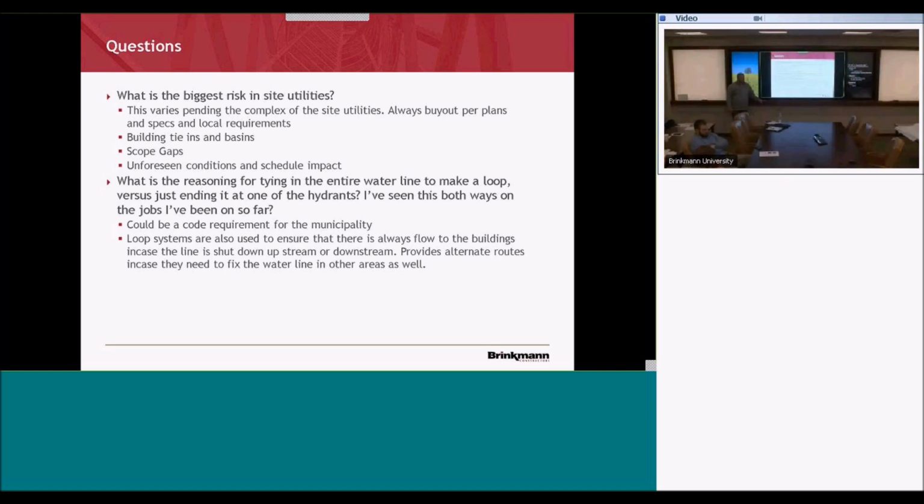We had to run a video down and figure out what was going wrong. That's a great exclusion on all renovations: exclude existing piping.